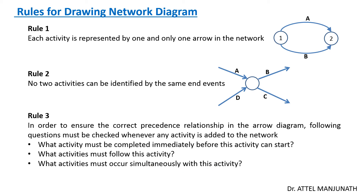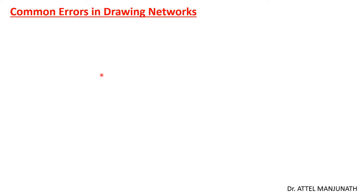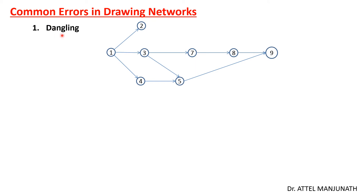When drawing network diagrams, we commonly make certain errors. The first is called dangling. Dangling is an error wherein an activity is completely away from the main direction or path of the network diagram — it is disconnected from the rest of the network. This kind of error is called a dangling error.